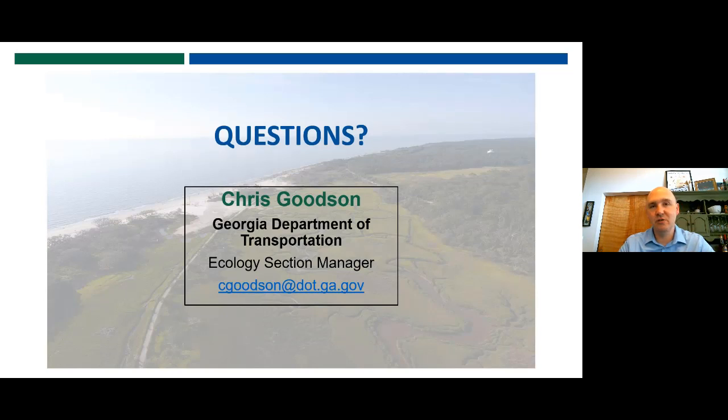And you still have that opportunity for the programmatic FWCA coordination by meeting one of those two criteria. But otherwise, they would be giving you project-specific requirements. And so, yeah, that's the only time that you would be assessing high-quality wetlands or wetlands in general. And I'm sorry, you also have to impact at least 0.1 acre, which if you have a new location roadway is likely the case.